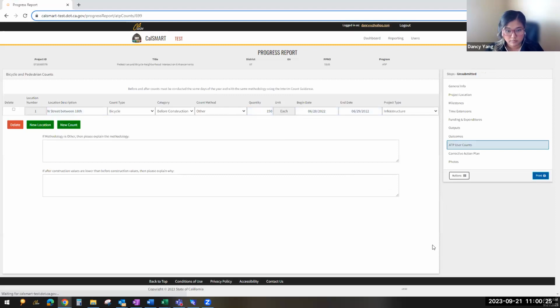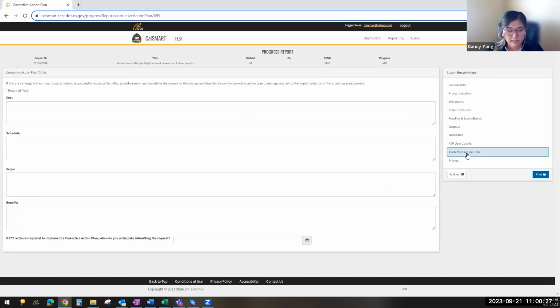I'm gonna click save. And then corrective action plan. If you see any item in regards to your project that is delaying or differing from originally programmed, please let us know everything. Scope, if you feel that you're gonna change your scope or anything like that, or even gonna request a scope change, please let us know. Indicate here in the comment box that we plan to do a reduction of scope, X, Y, and Z. We've submitted our scope change to our ATP district coordinators on this date, so that we know exactly where you are on the project.